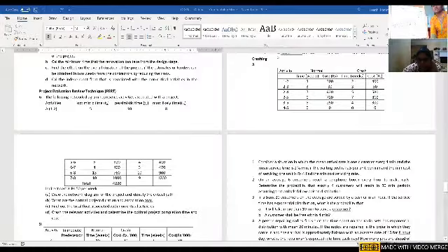So now this is our question, the 8th question. If you can see, my cursor is there, 8th question. So now in this particular question, this is the normal cost. The total of the normal cost is 4,220. So that is what I just wrote near the normal cost column. And there is also an indirect cost of rupees 50 per week. I'll tell you how to show that rupees 50 per week, as our entire project duration is in weeks.